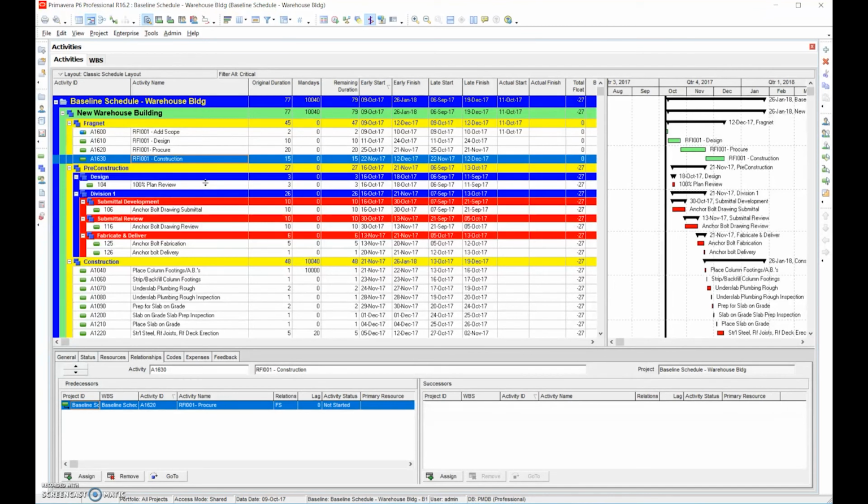On the very first activity, we put a start date, an actual start date, because we know that, and then we tie all the logic, all the predecessor and successor logic, until the very, very last activity in the Fragnet, and that successor will be tied into the existing schedule logic. Once that occurs, we review the negative float on the last activity, which is typically the contract completion date, and then we subtract that negative float from the negative float that we had on the schedule update. In our case, we had 69 days. We subtracted the 27 days that was part of the last schedule update.